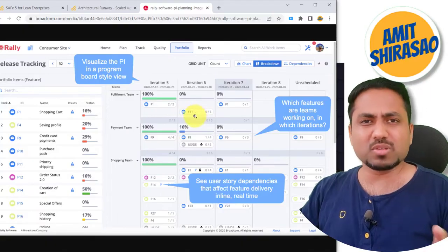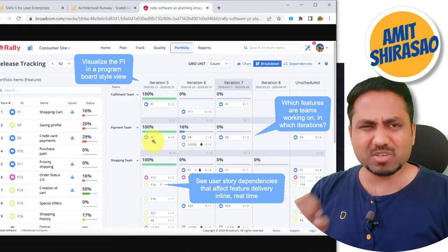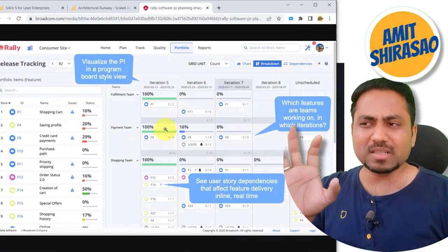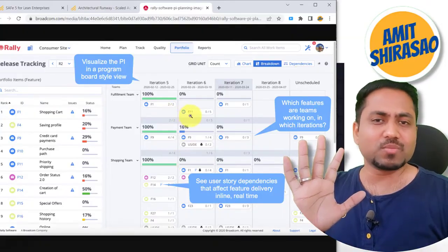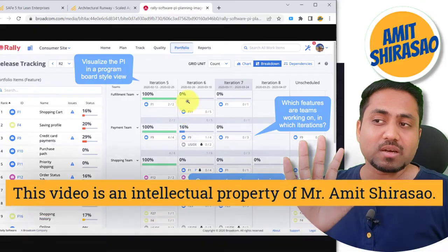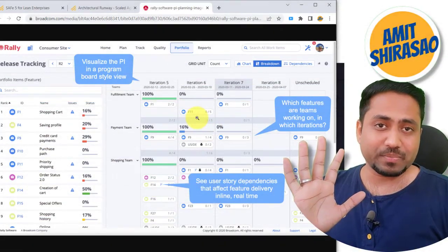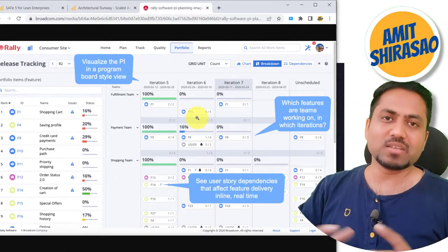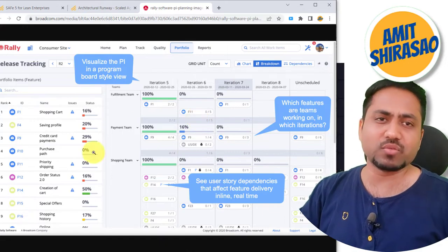You pick those stories earlier and try to complete them, if possible, in the very first week itself. Otherwise you should have done them at least by the end of this iteration. Then I'll be able to pick the dependent stories in the next iteration. That is what I'll request, and every other team can request every other team in a similar fashion, and finally one draft plan will be created.